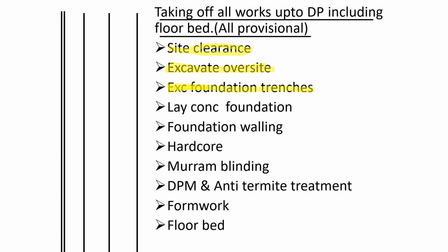Then we shall lay concrete foundation. The concrete foundation may be the strip footing. We shall do the foundation walling. Then we shall do the hardcore. We do the maram blinding on top of the hardcore. We do the DPM and the anti-termite treatment. We shall take off the formwork. Then we shall finish with the floor bed.